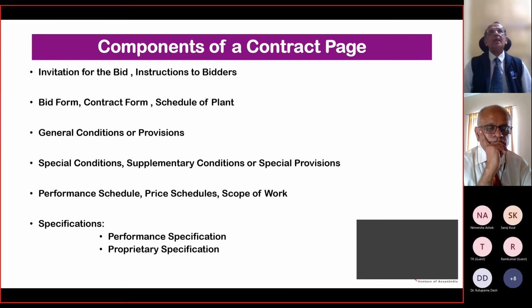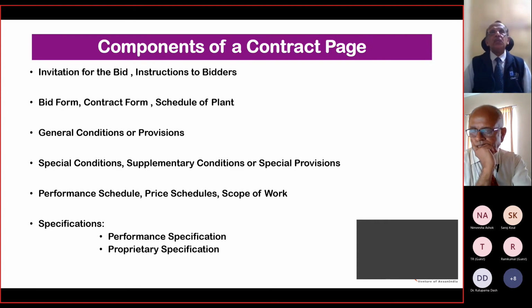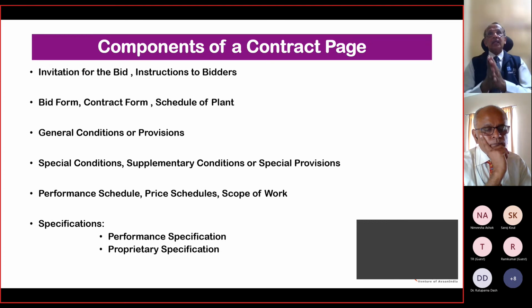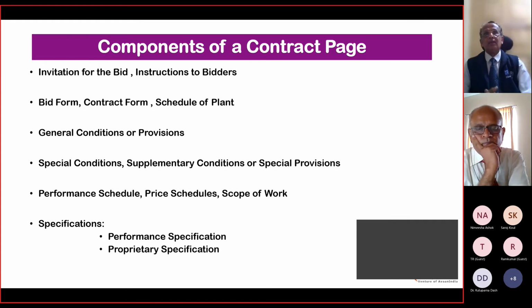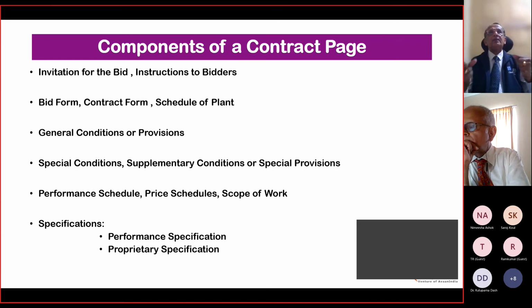Other things which cannot be incorporated in the purchase order, you should put in the SLA. Now, the issue which may come up as a point of contention is, let us say the order has been placed as of now and the lead time is 2 years. The question which is going to come up is, when the product is delivered within 2 years, what is the technology incorporated? Is it the technology when the purchase order was placed or at the time of delivery? Do you understand this typical situation?